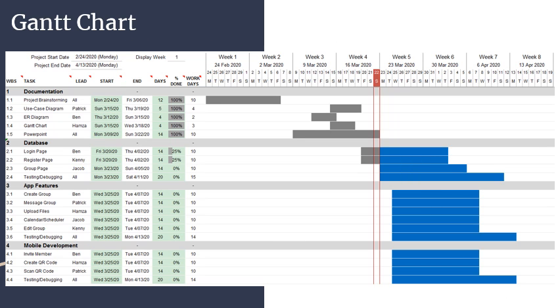This is the Gantt chart for our project. The first week was spent brainstorming the project, the stack that will be used, and the methods that we will utilize to complete each task. The week during and after spring break was spent finalizing our presentation, and the team will start development on the core features very soon. The current plan is to spend 2 weeks on each feature and a third week for testing and debugging. This Gantt chart is subject to change and will update to reflect group progress as we move on.